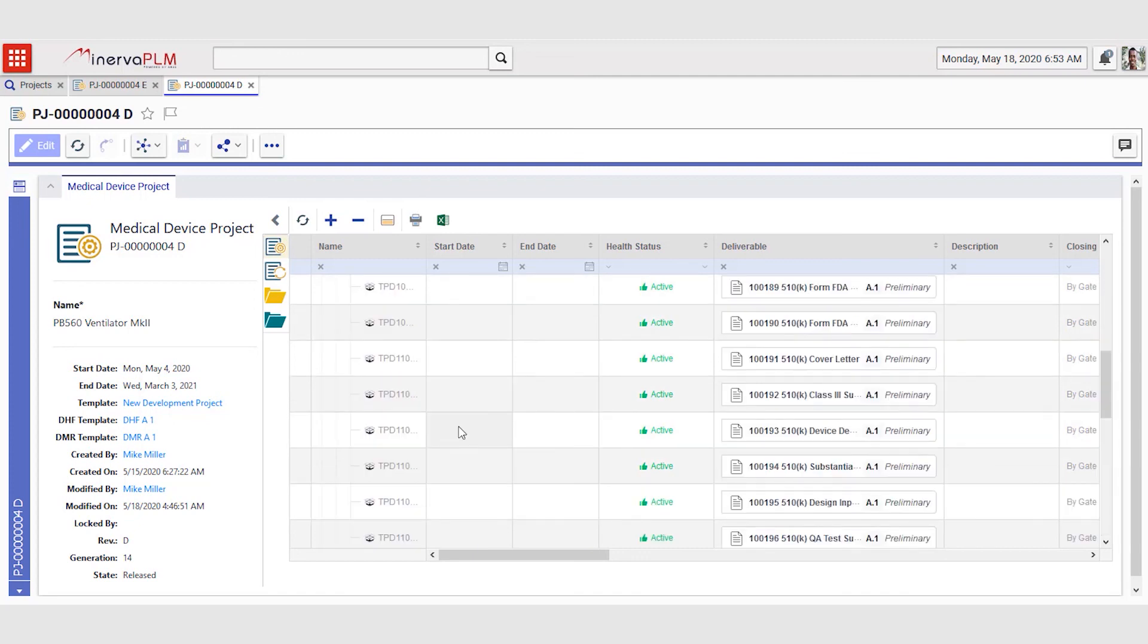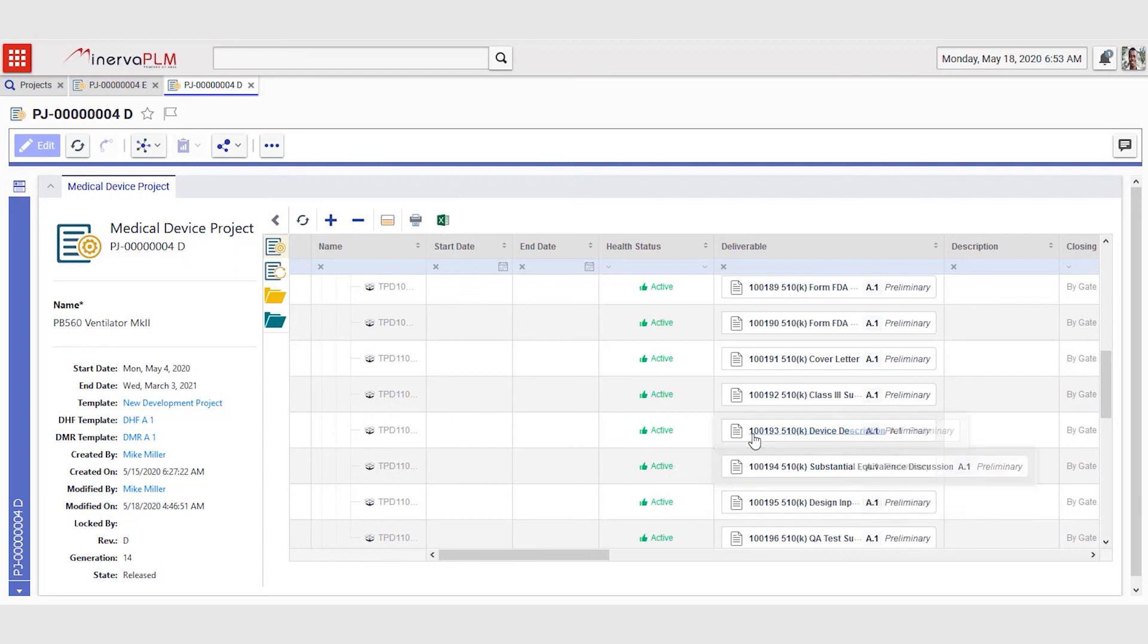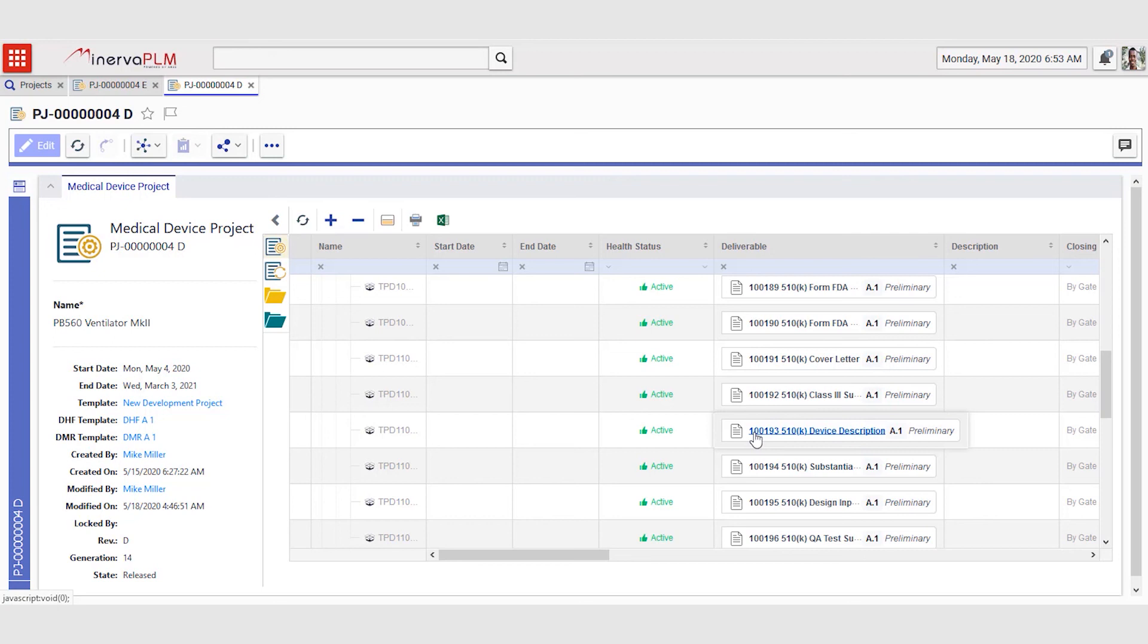In this baselining, Minerva PLM will not only keep the history of what was in which phase, but we also keep track of which version of each deliverable was actually valid at any point in time. If you open any file, any deliverable, any part from a previous version, you will always be sent to that specific version of the deliverable that was valid at that point in time, providing a very strong audit trail and true baselining of your projects.